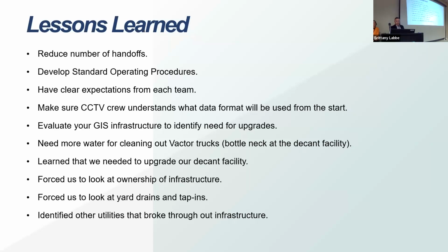Other things that we learned is the focus helped us focus on ownership of infrastructure, because there's private pipes and MS4 pipes. It forced us to go through our GIS system, go through all our infrastructure, and really figure out who owns what, because we didn't want to spend our time investigating, cameraing, and evaluating the private system.